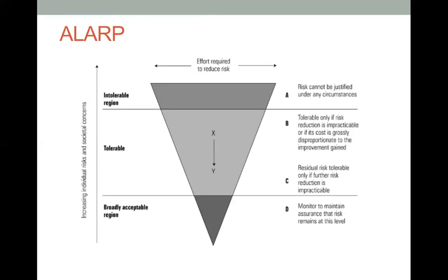In my experience, at one point of time, we wanted to launch a new product, and we understood that by the time of our launch date, it would not be acceptable, because we would have monsoon in that country. And we said it is intolerable. We can't address that because it is nature, right? What can we do? The option for us would be delaying it. So we delayed launching this new product, because we can't tolerate the impact.